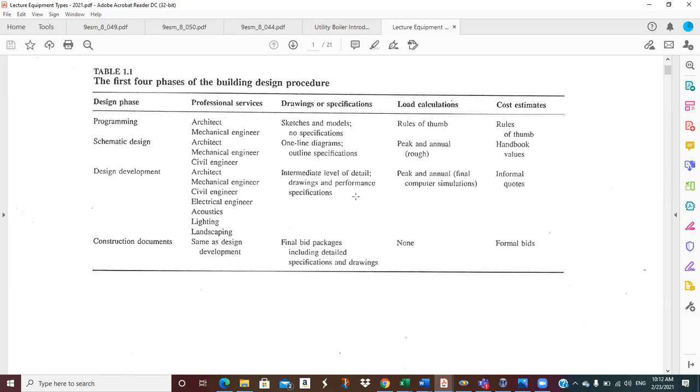The design build tends to get projects built a lot quicker because you're dealing right with the contractor, and he's ready to rock as soon as things are agreed upon. If you go through the architect, then all those construction documents have to be put out for bids, and that bid process can take a couple of months at least. All that gets posted and advertised, and then qualified contractors come in and get a copy of that, and they'll have to share it with mechanical contractors, structural, and electrical companies, and all that has to get put together into a final bid.